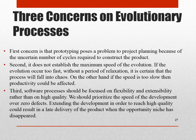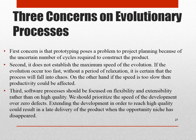There are three concerns on evolutionary processes in terms of prototyping and spiral. The first concern is that prototyping poses a problem to project planning because of the uncertain number of cycles required to construct the product. Second, it does not establish the maximum speed of evolution. If evolution occurs too fast without a period of relaxation, it is certain that the process will fall into chaos. On the other hand, if the speed is too slow, then productivity could be affected.